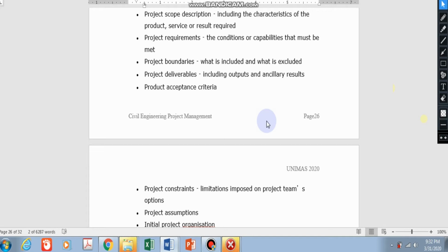Better value will usually be cheaper cost and higher quality, better performance, or same cost, higher performance, or same performance, lower cost. So this is a balance. Value engineering is a balance between cost and quality. It's about better performance with a lower cost, or same cost, or lower cost but same performance at least, and no lower performance. And this is the part that you tinker with.